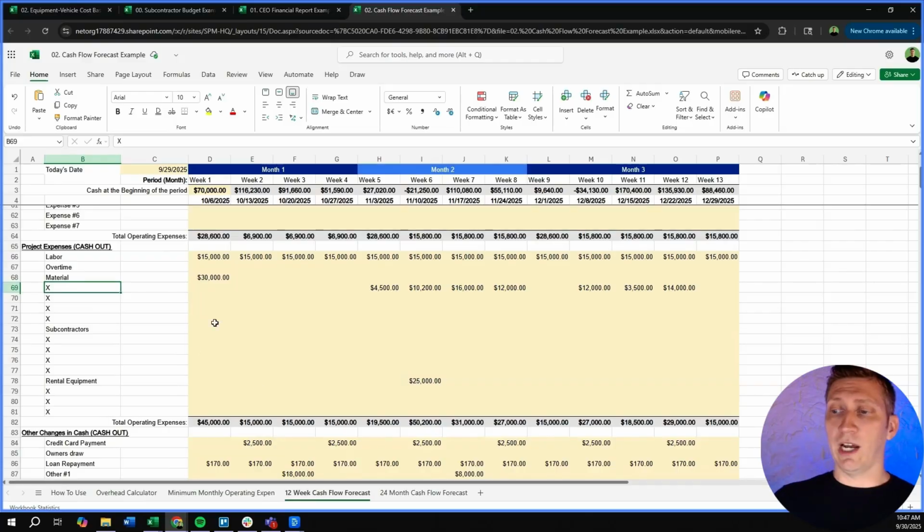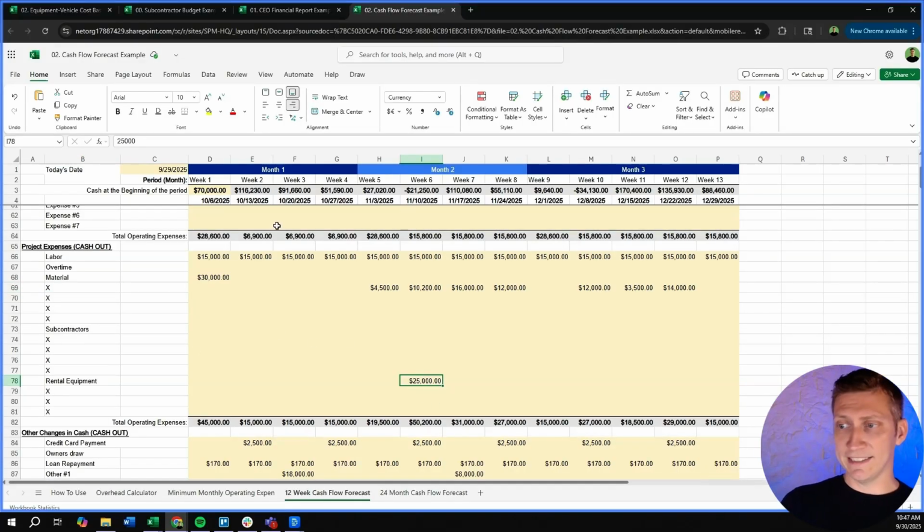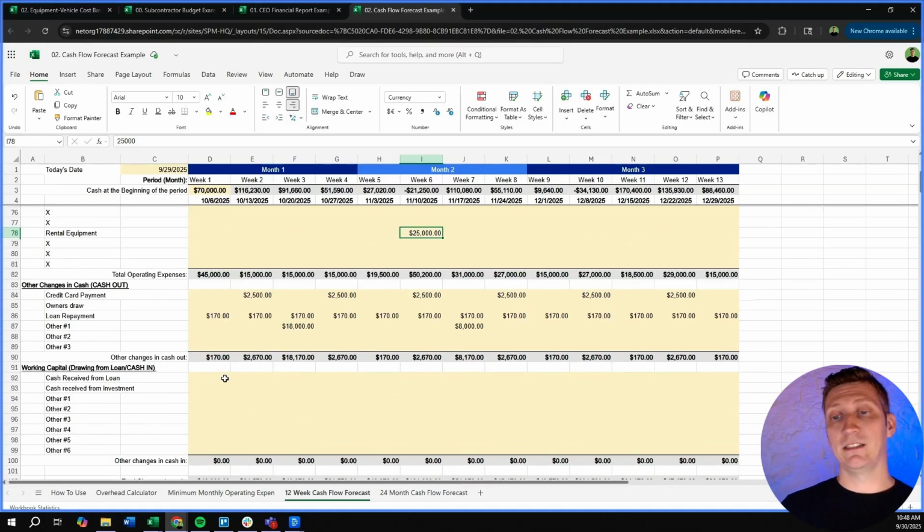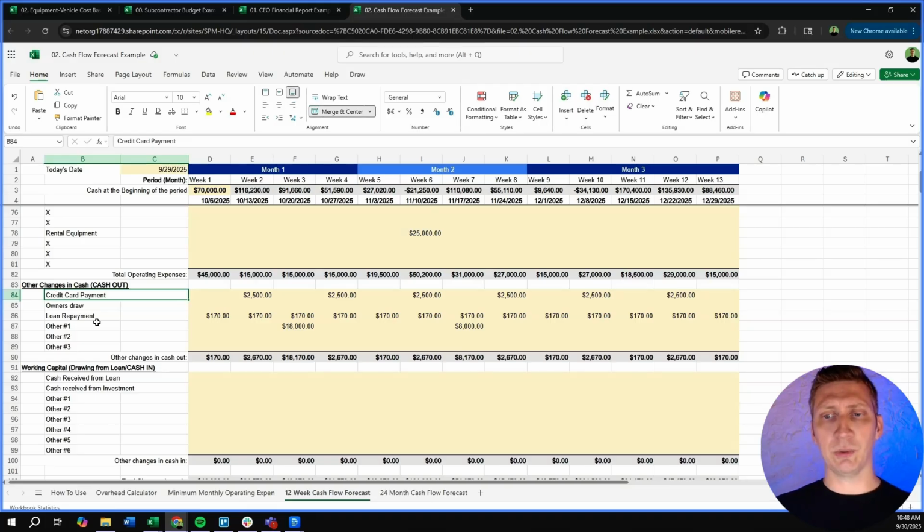So you go through and you time all of that. When are things hitting? Again, week 6, we know that if we use it this month of October, that this 25,000 is going to hit in November and it's due 10 days or whatever your rates might be. That's cash out number 2. The third place that money leaves your account, and a lot of people skip over this part, is where you owe money. Your credit cards, your owner's draws, maybe you have bonuses, you have loan repayments, you have vehicles, you have sweep accounts, whatever you have. This is where I put the money where it comes out of your account.